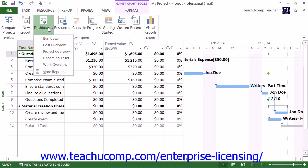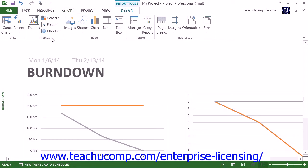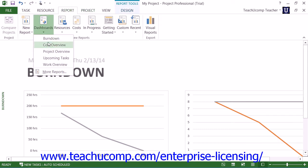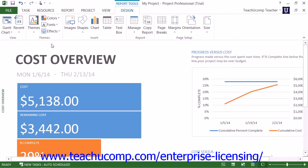Within the Dashboard Reports category, you have the Burndown report, which shows the amount of work, tasks completed, and work remaining. There is also the Cost Overview report, which shows the current cost status of your project. It displays planned costs, remaining costs, actual costs, cumulative costs, baseline costs, and percent complete. It is used to determine if the project will stay within its budget.